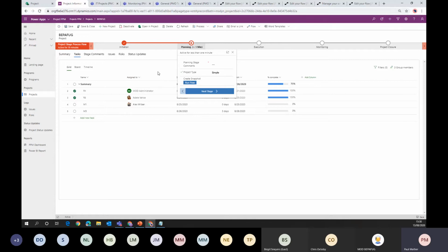What we've also got in this application is snapshots. So what a lot of organizations like to do for the data within projects is have a history or a snapshot. So what that project looks like over time or at certain gates. So behind the scenes, we've got some Power Automate flows running. Whenever the project is modified, we snapshot the data, but we've also got the ability to create a snapshot of the data on the business process flow here.